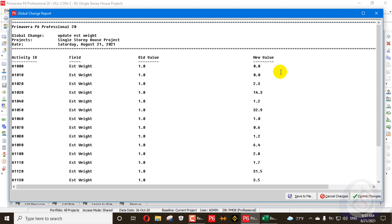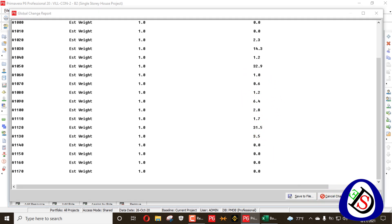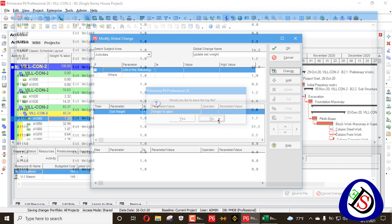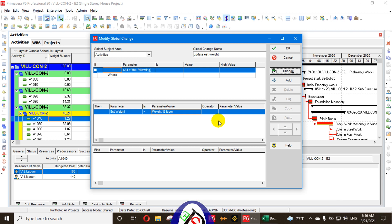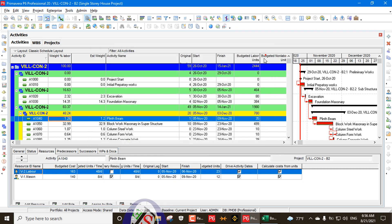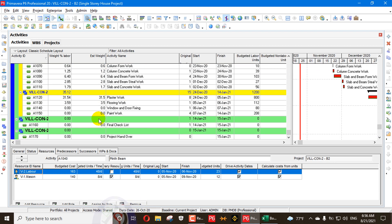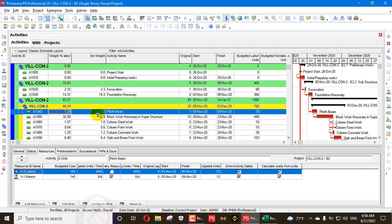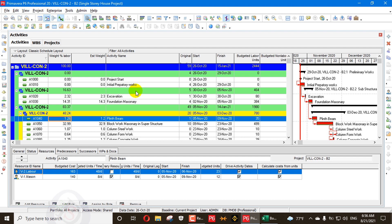When you click Change, the old values are all 1. After the change they will be updated to values like 2.3, 48.3, etc. When you commit the changes it will ask to save the log — say No. Note: the first time you run this there may be an error saying some activities cannot be converted from 0 to 1. The second time it will work. After committing, you can see all weightages are updated — 2.3, 14.3, 32.29, and so on.